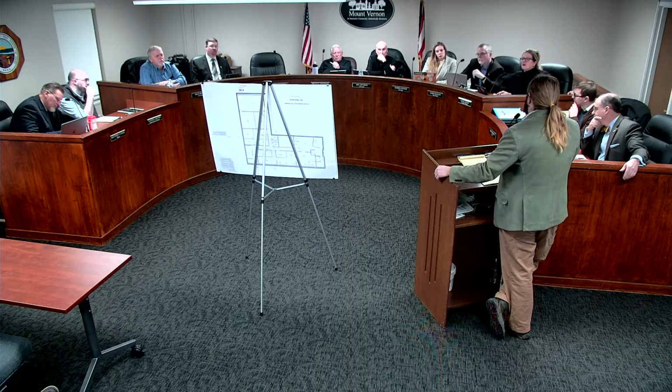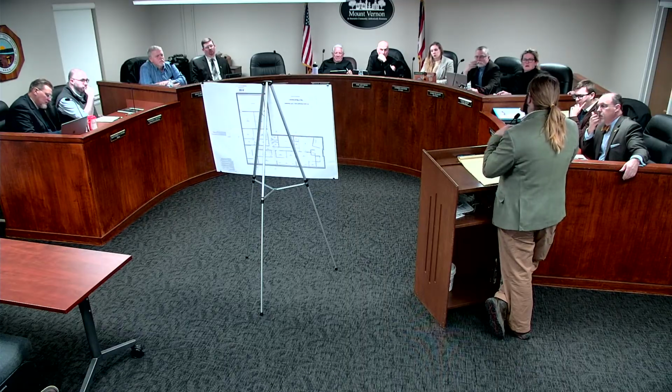That goes clear out to the orchard? Yes. We don't go clear to the orchard, but Glen Road does go to Glen Hill Orchard and then on to Lehman Road. So part of this is where we have New Gambier Road, Pleasant Township does plan to bid a chip seal. They plan to chip seal their portion of New Gambier Road. So in theory, this would become a partnership. We bid it, they bid it. If the same company gets it, it would all happen at the same time.